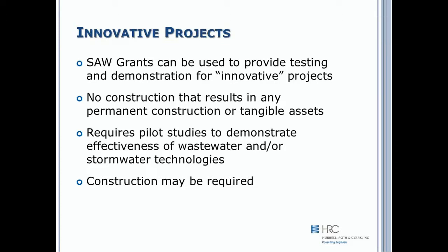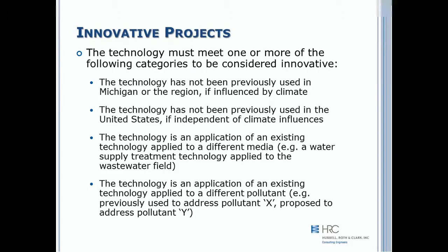And if the pilot studies show that this is cost-effective and it works, then construction will be required within 3 years. And these are the criteria that DEQ has come up with for innovative projects. Technology needs to meet one of these following categories. If it is influenced by climate, it cannot have been previously used in Michigan or the region.